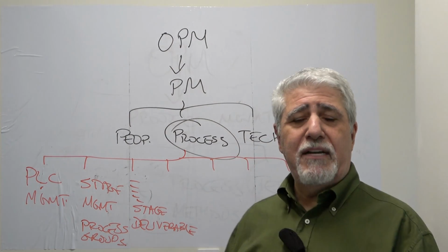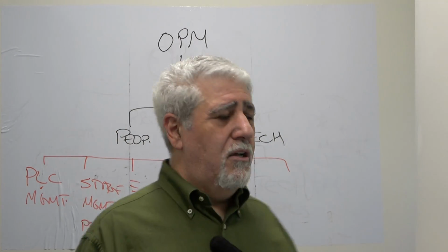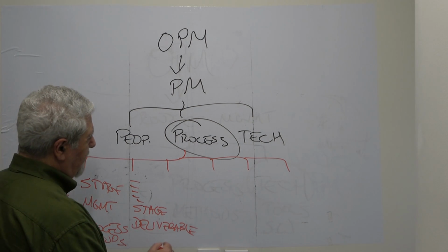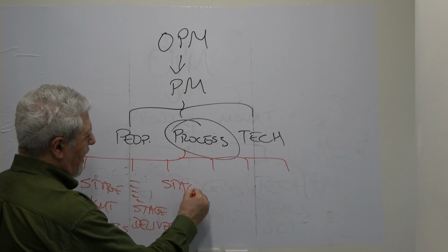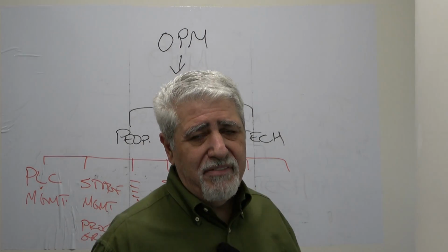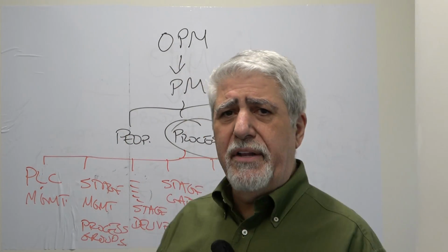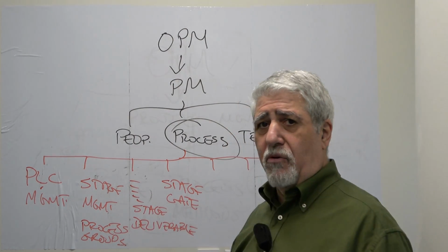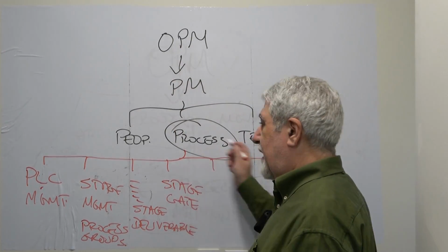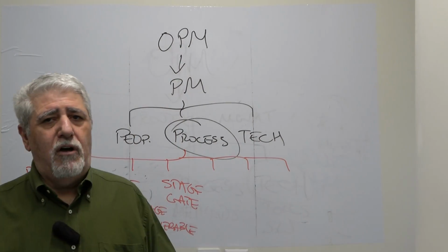Now, typically in project management, proper project management advises us to have something called the stage gate process. So when we have this stage deliverable, typically these stage deliverables go through a stage gate, right? Depending on where you are on the life cycle, the stage gate could have multiple purposes, multiple objectives. One is to verify the work that was done before is done according to organization standards, procedures and guidelines. Two, typically authorize the next stage, right? That's typically the most common objective of a stage gate.